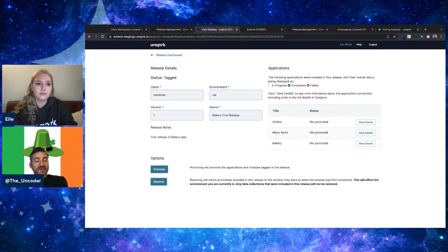And maybe you have to deploy it at a later time, right? Maybe that's a few days later because, one, you just want that period of downtime, maybe for additional UAT or things like that. Two, maybe you have specific change windows. A lot of the enterprises that Uncork is working with, and a lot of the enterprises out there that we'll be working with soon enough, you can't release whenever you want, right? Often it's a very fixed change window at a certain time of night, after a change review process. You want to be able to stop before then and be done before then and be ready to go. And then maybe just click the button to promote it later on.